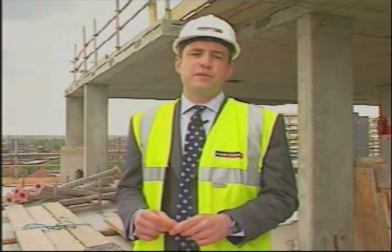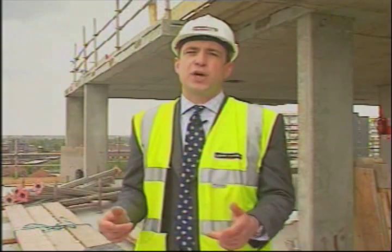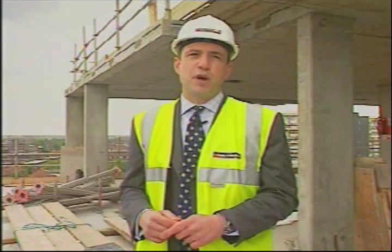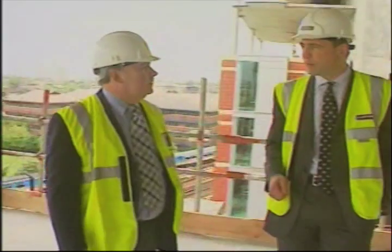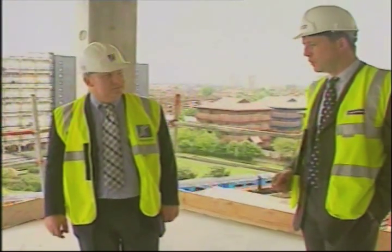The main benefits that we've seen here is the cost effectiveness of the reduced labour and materials used on site. This has led to an ultimate 4-week reduction on our overall construction programme. Reduced costs in labour and material, and a month ahead of schedule. That's music to many ears in the building industry.